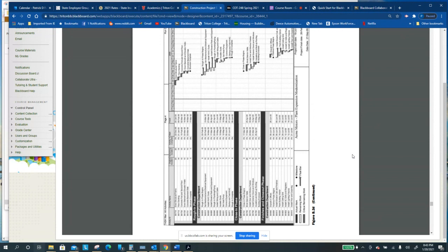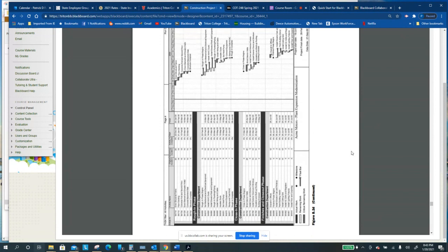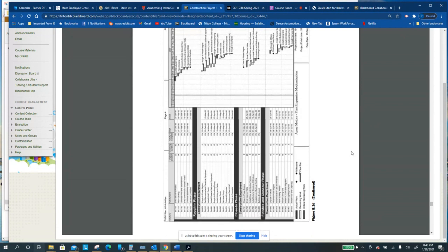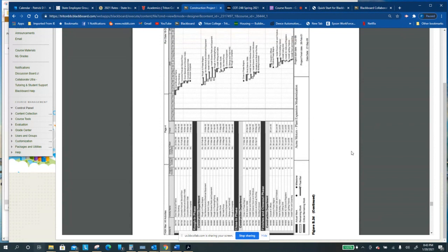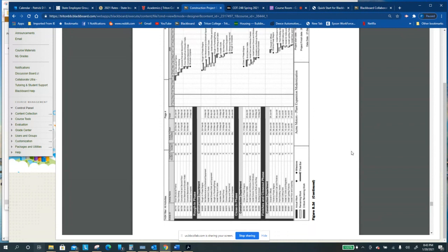The most precise way is to ask the person or the company that's doing that work how long it will take them, as opposed to assigning them how long it's going to take them. Making them think about it, making them consider what their plan for the work is going to be, is a lot more accurate than someone else deciding, well, we need this done by this date, so you have 3 days to do it, figure it out.